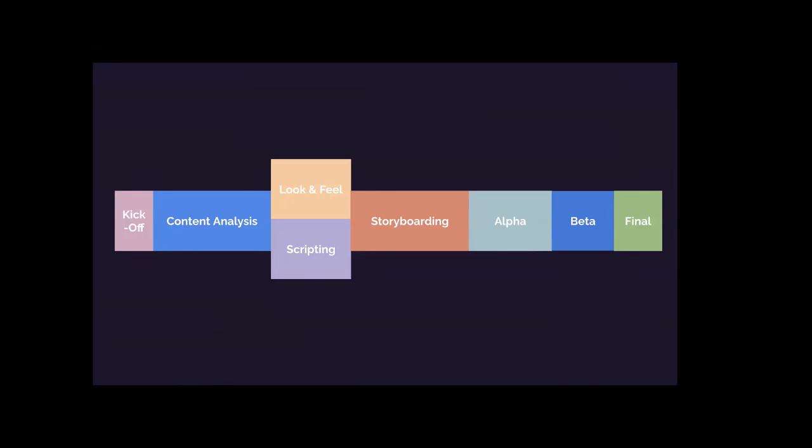We do a lot of stuff in Articulate Storyline, but we're an agency that has 100 projects going on at once. Each project has its own audience, its own tool, its own technology infrastructure. The way that we manage it internally is with a project management philosophy called critical chain project management, CCPM, and that's where the zipBoard tool comes in, making sure that every resource is freed up for the role that they're about to do while moving forward. And that's even the client as well.